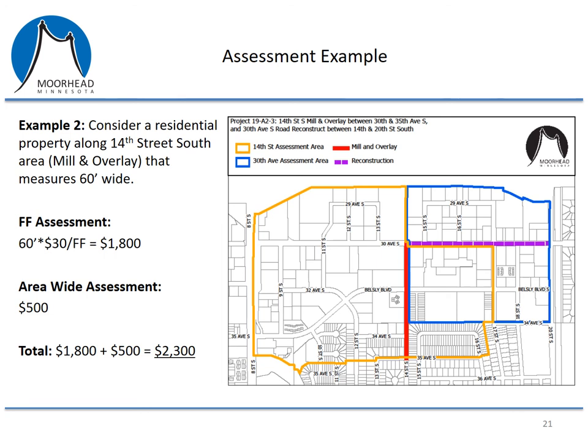For example two, let's consider a residential property on 14th Street South, which is the mill and overlay area, and that the property measures 60 feet wide. The front footage assessment would be 60 feet times $30 a front foot — the rate for a mill and overlay — for a front footage assessment of $1,800. This property would also receive an area-wide assessment of $500, so $1,800 plus $500 gives a total assessment of $2,300.